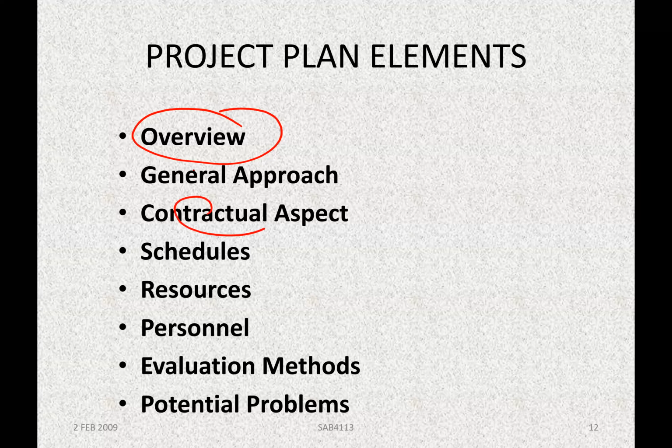Contractual approach. Sometimes the contract tell us in certain time frame, certain work have to be completed, especially for marketing purposes. Sometimes developer want to launch first phase, second phase, etc. So they will set certain constraint in terms of contractual matters. So you must follow those things.